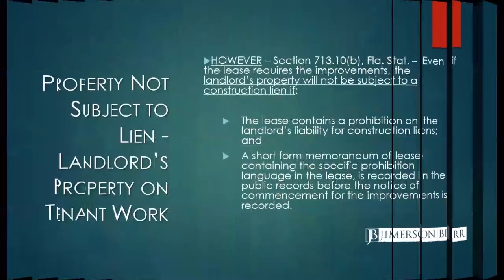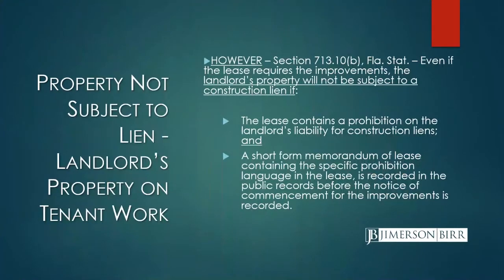So in certain cases, if the lease requires a tenant to make improvements, the landlord's interest in the real property may be subject to a construction lien. But as always in the law, there's a big exception to that. And the exception is found in 713.10(2)(b), Florida Statutes. This provides that even if the lease requires the improvements to be made, if there's a provision in the lease that prohibits the landlord's property from being subject to the lien, and the landlord records a short form or simple form of the lease that contains the provision in the public records prior to the notice of commencement being recorded for the improvements, then the landlord's property is going to be exempt from the lien.